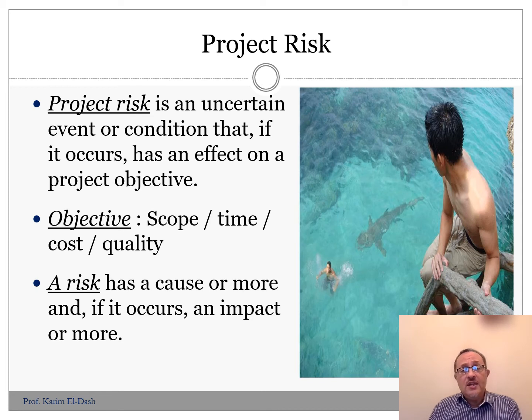If we are reducing the scope, we have to study whether that is going to have impact on the feasibility of the project, the financial feasibility, technical feasibility, marketing feasibility. So changing the scope is harder than changing the quality. But changing time and cost is very common in most of the projects.